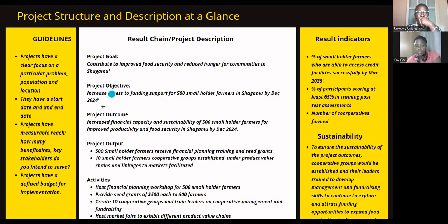I would prefer that under each specific objective, the activities contributing to it come under it, and each specific objective has its own indicators of measurement. If we structure it that way, it will help learners move from one objective to the activities, to the indicators, and then to the next objective. It's a lot better than the logic framework for understanding's sake, because they don't have to deal with the MOVs and then the assumptions.